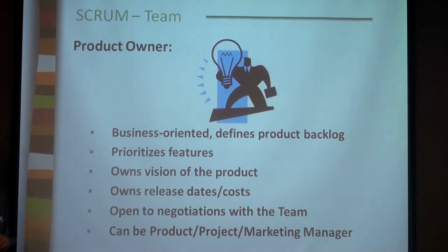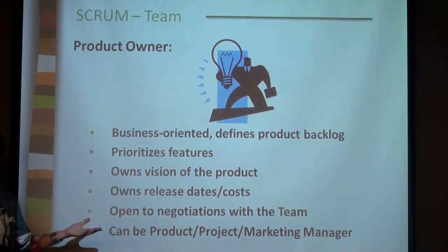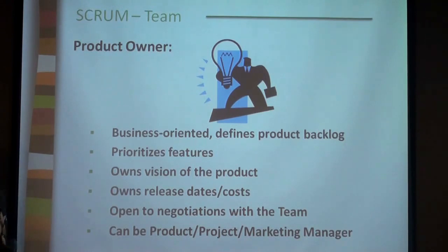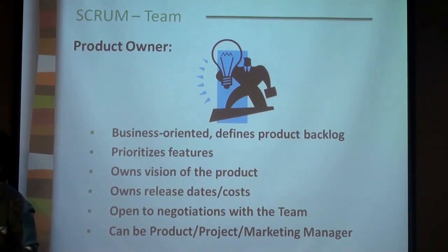And we'll go through this process because the product owner may want to have like 20 features, but if implementing those 20 features takes us to a February release, then it doesn't make any good. So this is where the negotiation process takes place, and the product owner negotiates with the team. Okay, what if we don't do 20 features? What if we do these 12? Can we release by November, for example? Or if we do these 5, can we release by October? So this process is happening all along, all the sprints, all the time boxes.